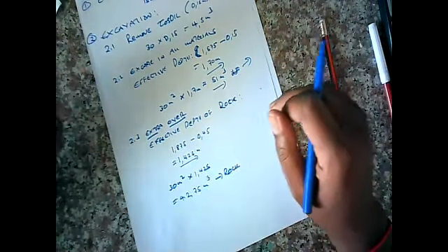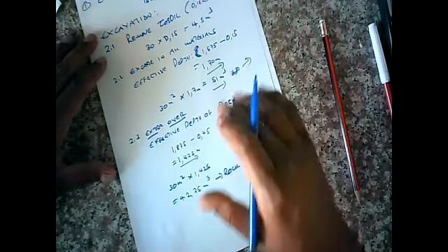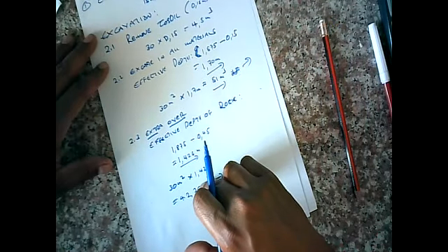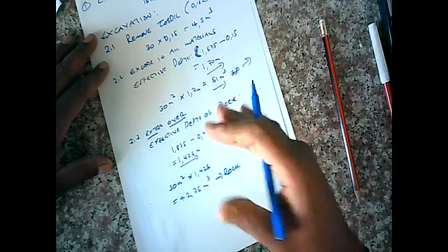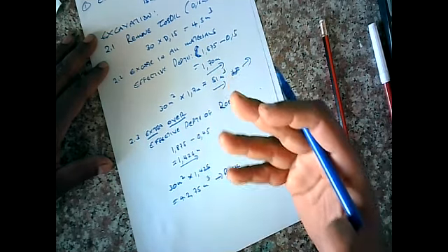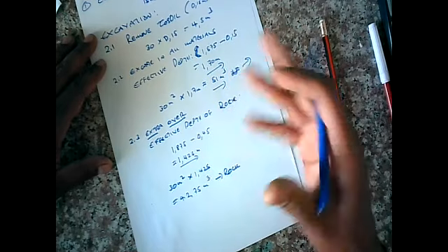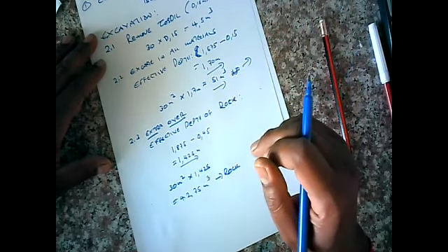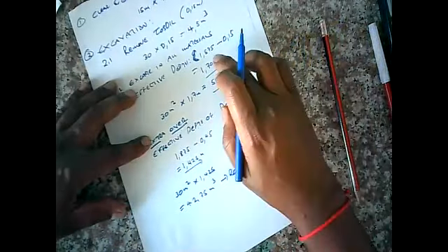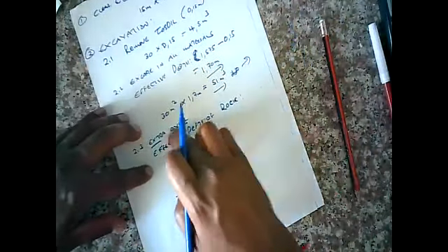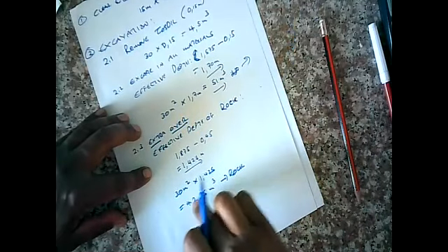So, rock. Now, the problem is when it comes to costing. Remember, when the machine works, it's going to work harder to excavate rock. Because it's working harder to excavate rock, it is unfair to expect the contractor not to be paid for that extra work. So, we'll pay him to move that much of material, but we'll pay him a little bit extra to excavate that much of material.